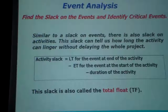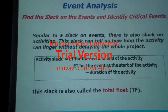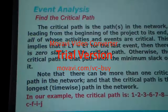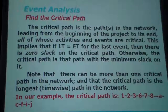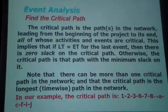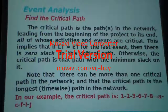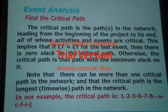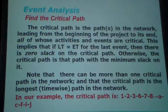This difference in time between the critical events and this one is called the slack — that's the time you should be working for this parallel work. Now it's understood. The slack is also called the total float. In some books it's called float, but because we are in a series from the first chapter, we are using slack, so we continue as the slack. Now, some key definitions: Critical path — the critical path is the path in the network leading from the beginning to the end of the project where all activities and events are critical.